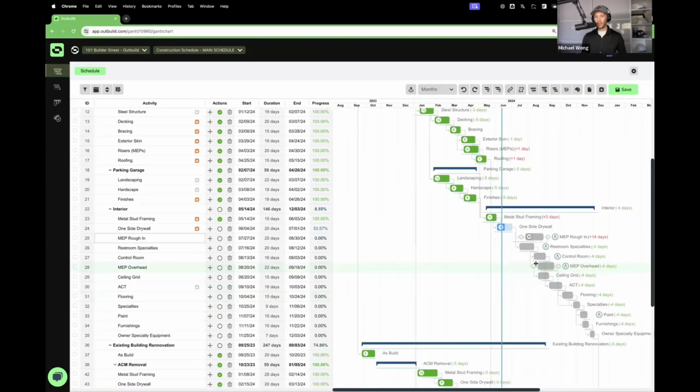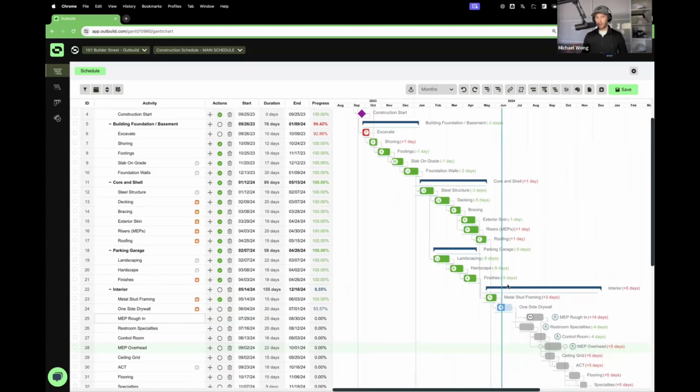If I were to move one of these, you can see that all the rest of them that are tied logically have moved off of their set baseline. And it gives you just a quick oversight of, okay, phase plan view, our main plan, we're ahead or behind a certain amount of days, which sets up the whole last planner, the look ahead, and all your other sequences of work that follow through the process here.